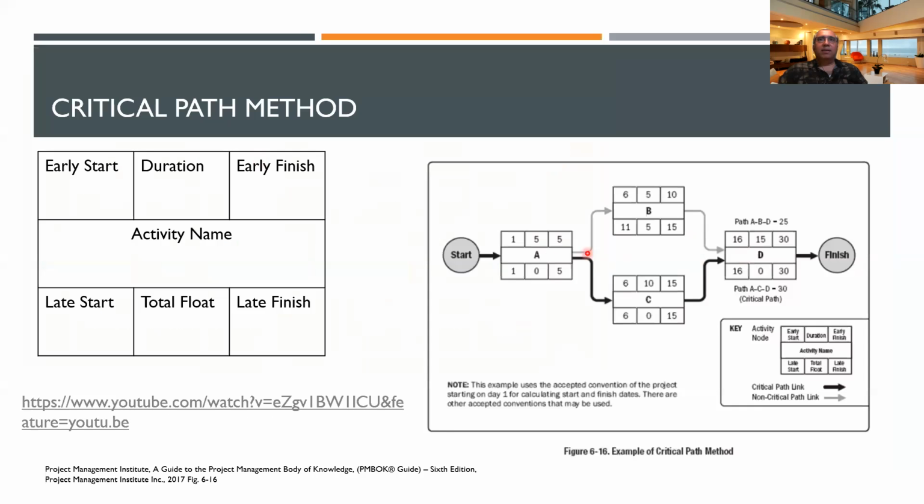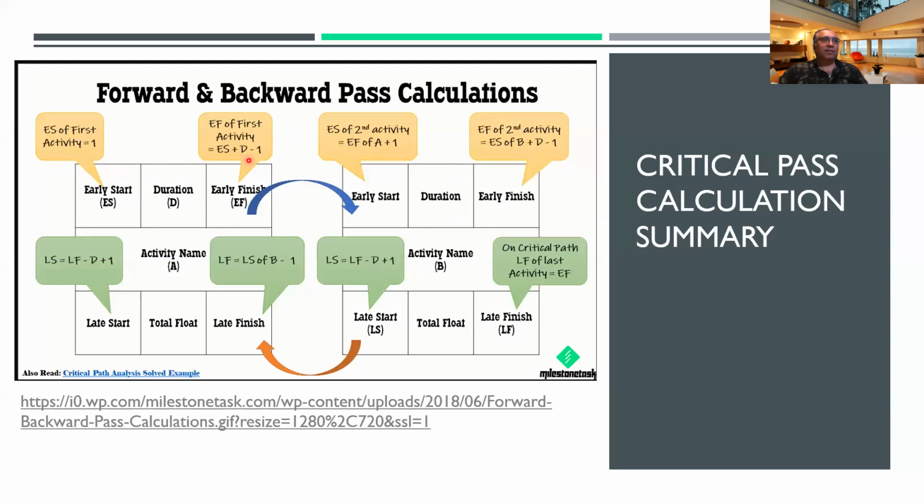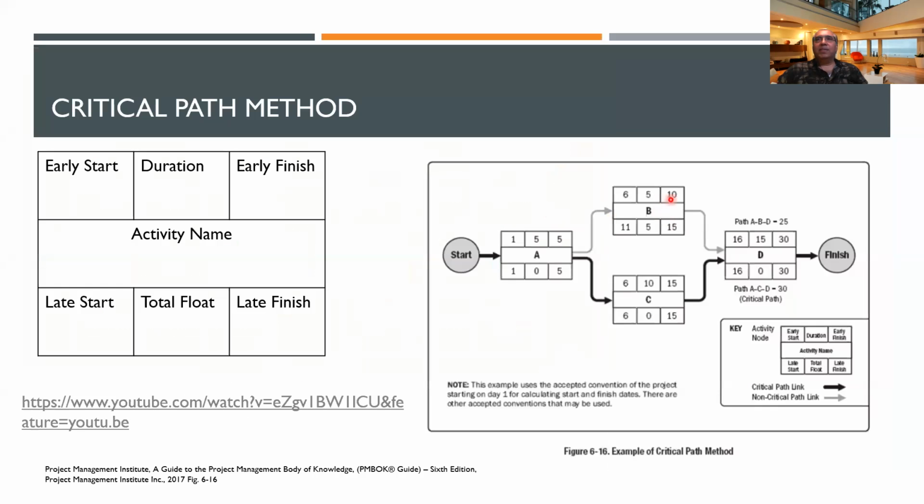Same thing we did here, 6 plus 5 minus 1 gives you 10, right? Grade 2 math or grade 3 math? Maybe grade 4 math, right? Okay, and then when you take your early finish and go to the next day, you have to add 1, right? See here, when you have 15 from these two, you have to add 1. Here you had 5, you had to add 1 because it's the next day.